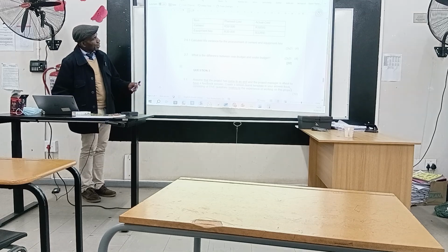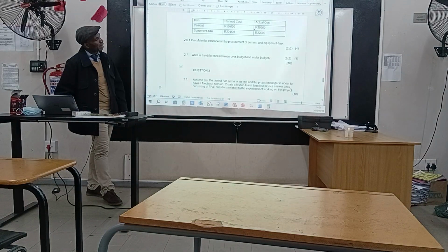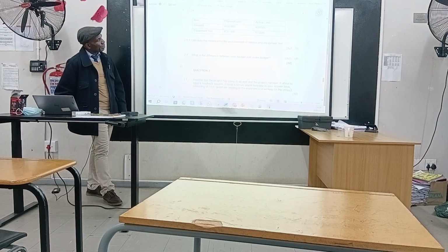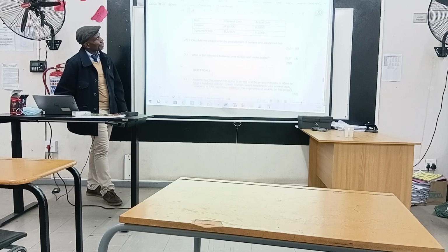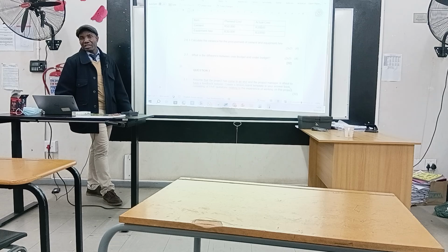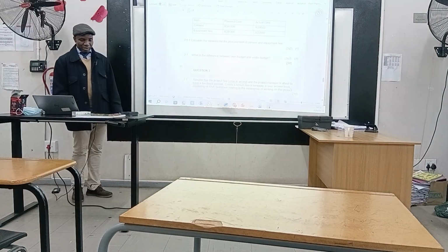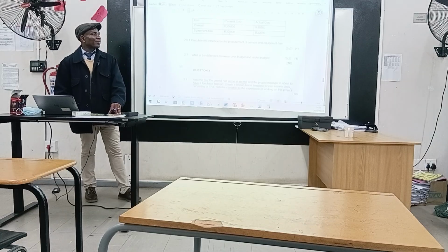So now let's look at the table. You have the planned cost and the actual cost. So let's look at the cement as an item. So 50,000 was planned, and what was spent is 39,500. So you see, in this scenario, what was spent is less than what was planned. So there's a kind of savings here. Then look at the equipment hire, right? 30,000 was earmarked, was planned for the hiring of equipment.